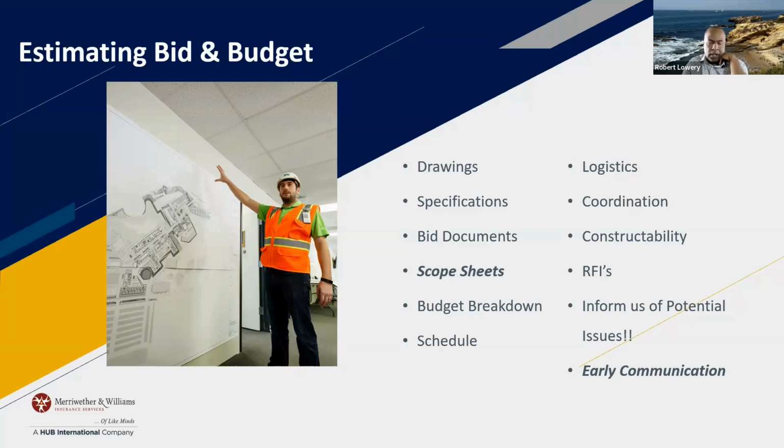And also, when she was talking about your budget breakdown, if you're a GC and you don't have a number for a certain scope or activity, do a plug number. And that goes back to having historical data that Jane was referencing. Because you're under the gun and all of a sudden it's like, oh man, I don't have fabrication, specialty metals, miscellaneous metals. You're like, okay, I can go back to my sheet. I know what it is. Let me plug it in there.